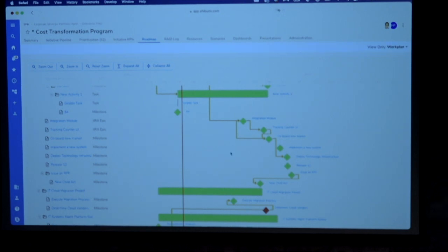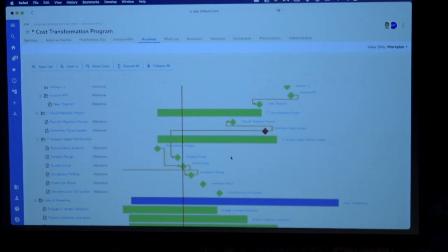What you can also do here is, we've talked a lot about dependencies. Dependencies take a ton of different forms. It's not just milestone to milestone. It's not just work plan dependencies. I'll touch on benefit dependencies in a bit. That's another key one for us. But what you can do right within the Gantt is simply drag a line between two diamonds, and I've created a dependency by doing that. And behind the scenes, I've created an association. Actually, a lot of stuff just happened behind the scenes. But that's all you have to do in the UI to bring it to life.